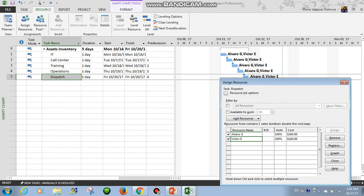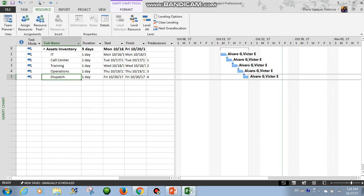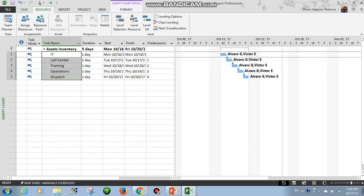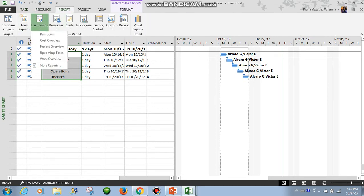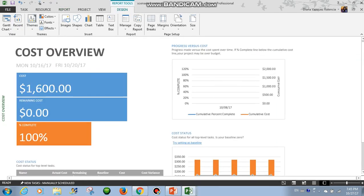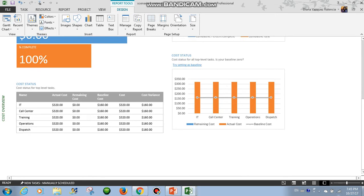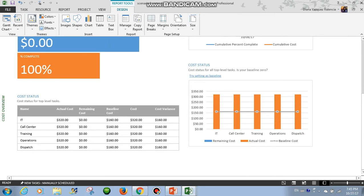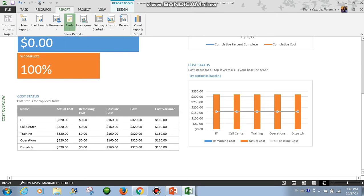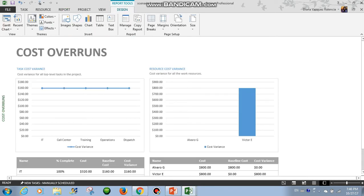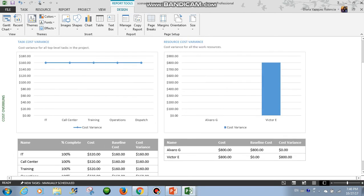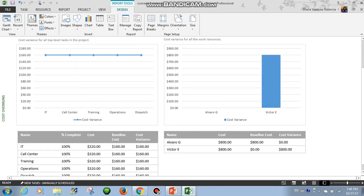So we expect to see that the cost increases to double. We have to let project know the work is completed. Let's see the cost overview. As we expected, the cost has doubled. And we have cost variance per each task — $160. Here we can also see the cost doubled for each task. And for the resources, Alvaro didn't have any variance. But Victor has $800 variance because he was not planned to work, as we can see here as well.